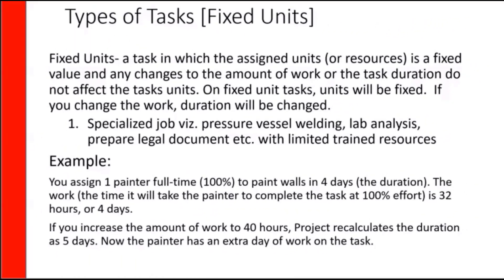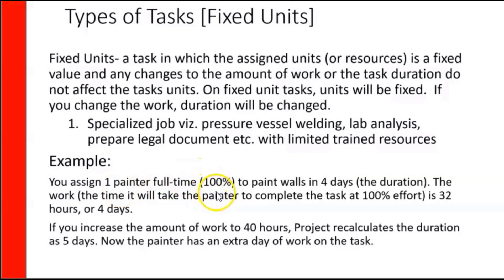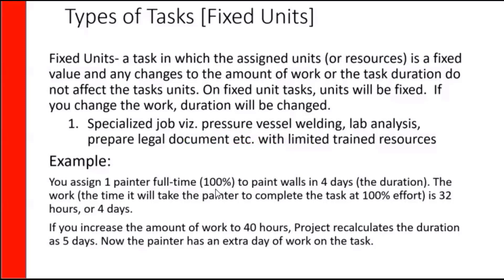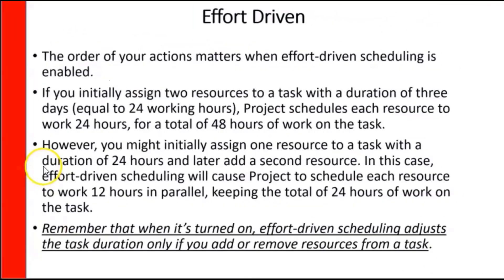Fixed units is a task in which the assigned units or resources is a fixed value, and any changes to the amount of work or the task duration do not affect the task units. On fixed unit tasks, units will be fixed. If you change the work, duration will be changed. For example, you assign one painter full time to paint walls in four days. The work — the time it will take the painter to complete the task at 100% effort — is 32 hours, or 4 days × 8. If you increase the amount of work to 40 hours, project recalculates the duration; now the painter has an extra day of work on the task at 100% effort.